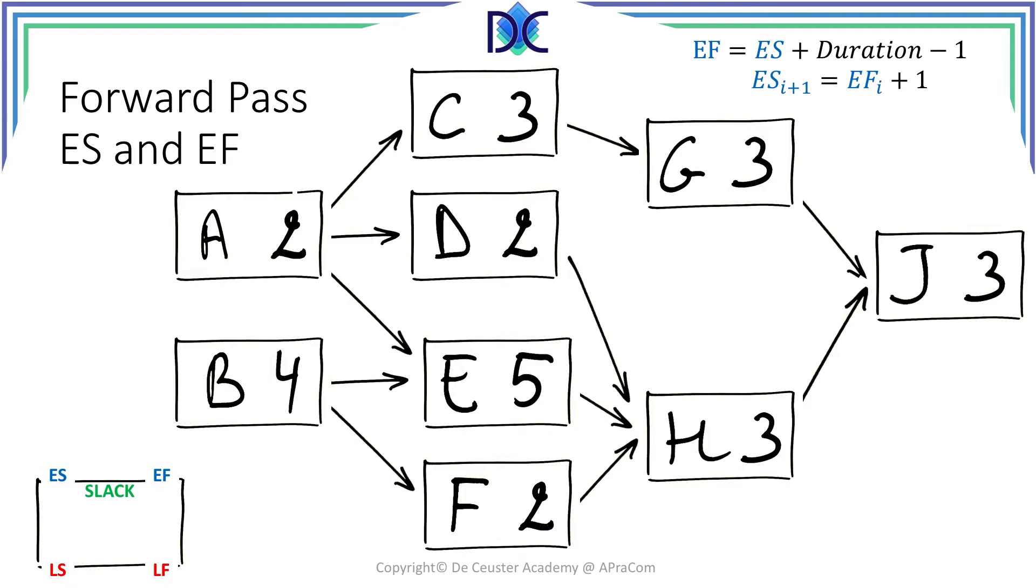When we look at the project we see that there are two activities which have no precedence. It means they are the first activities that we will start working on once the project starts. Let us assume that we will start with the project on April the first. So activity A will start on April 1st.